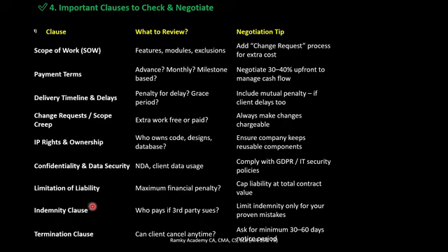At the same time, indemnity clauses: who pays if a third party sues for the kind of work delivered, and both the parties indemnify for the work they have promised, for the terms they promised in the contract. So with these indemnity clauses, the supplier indemnifies, saying, yes, I am delivering this work and I am ready to indemnify whatever work I delivered for a certain period, right?